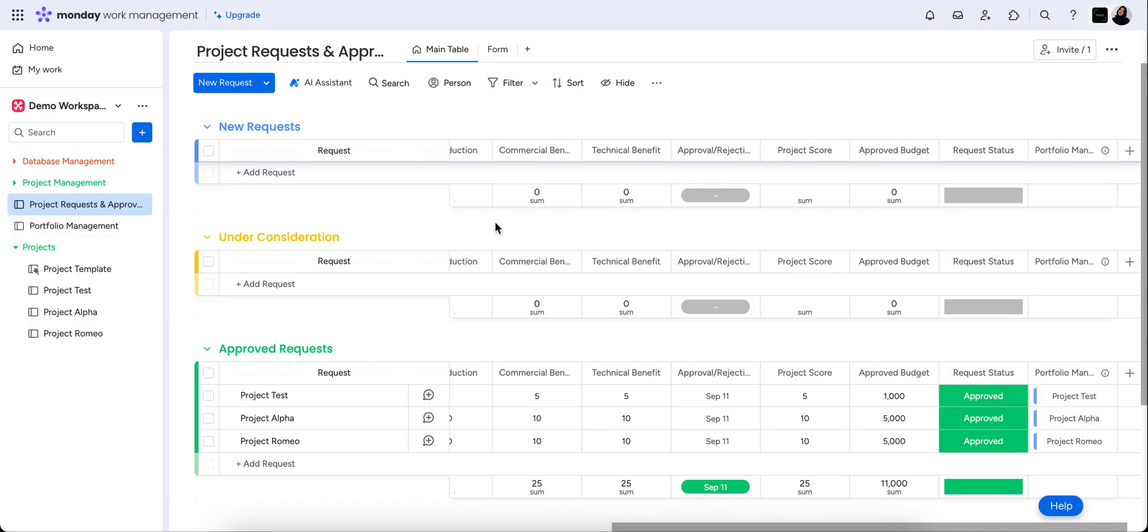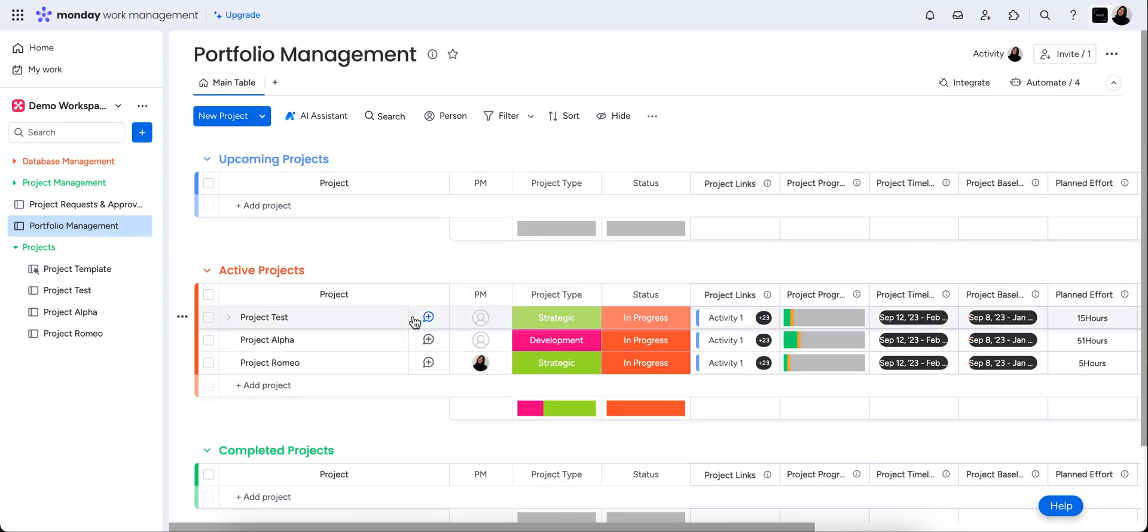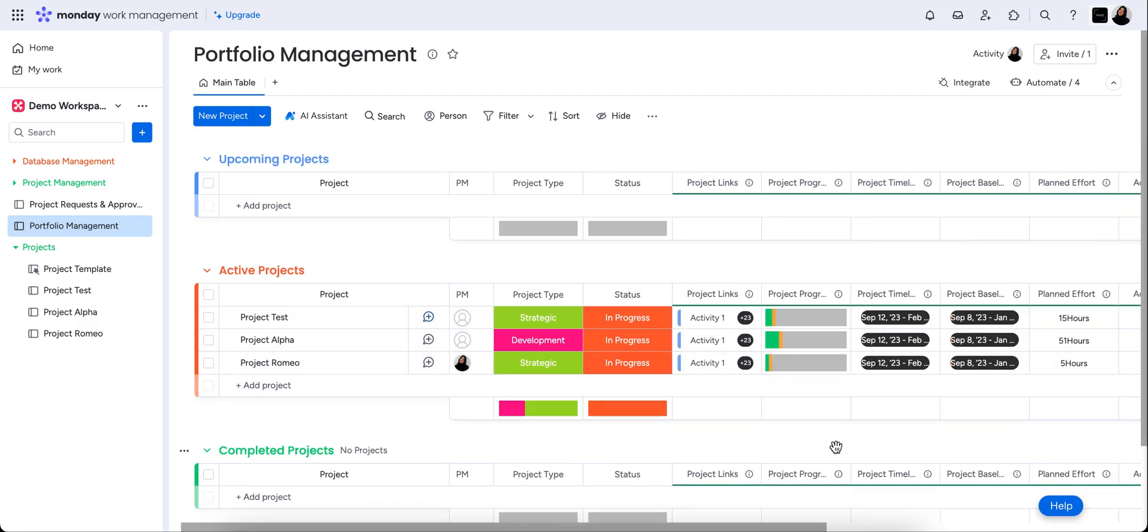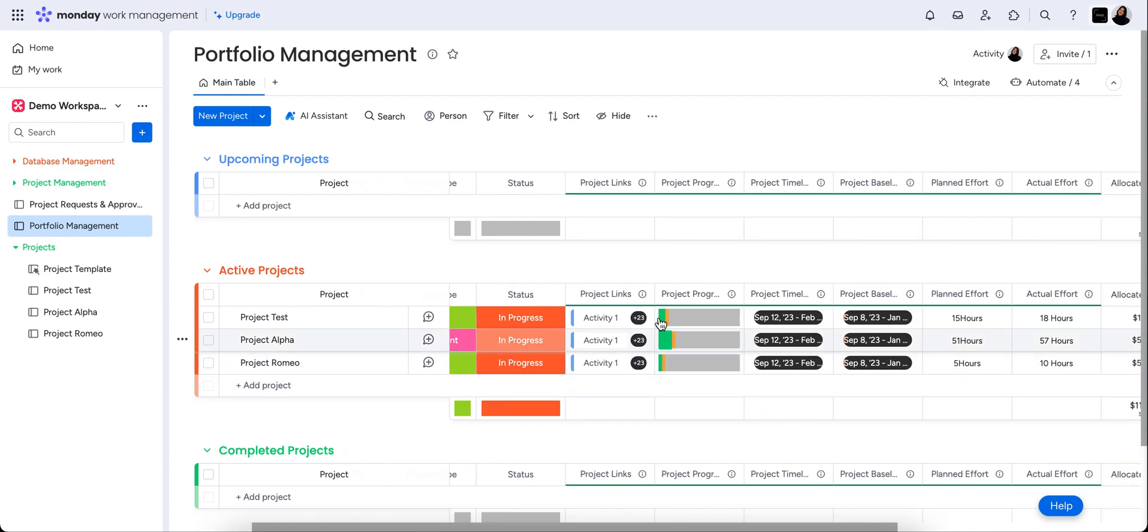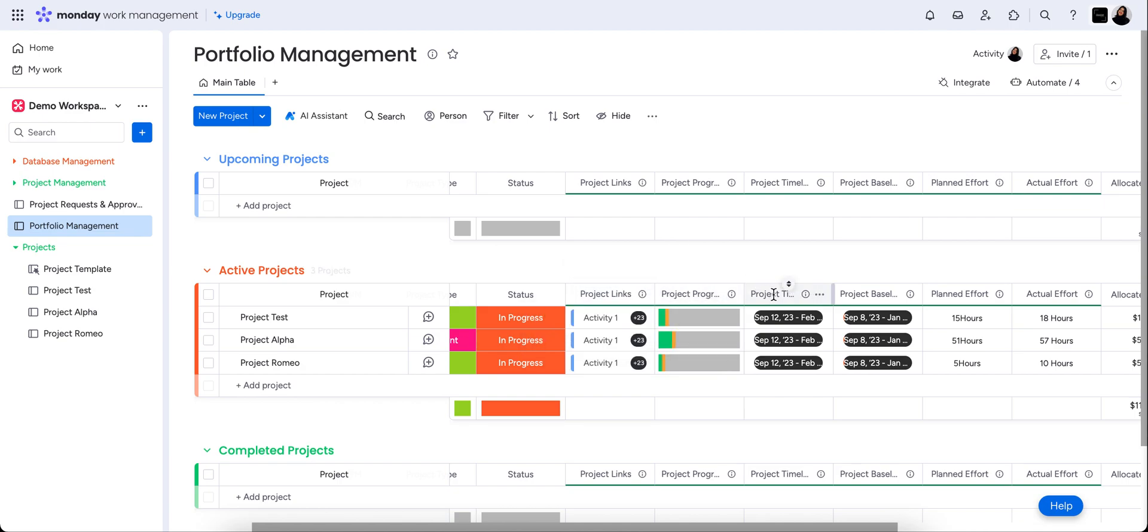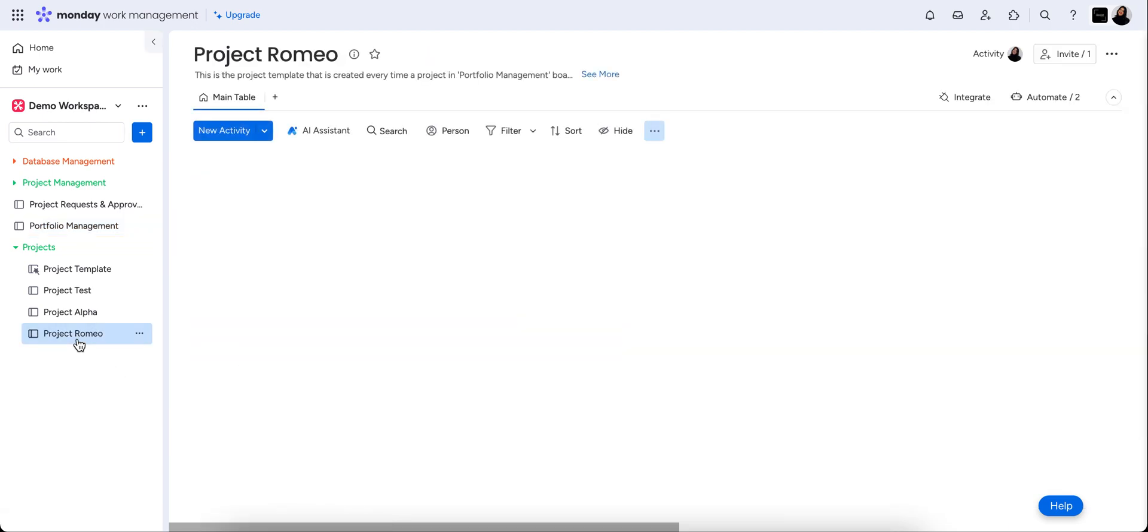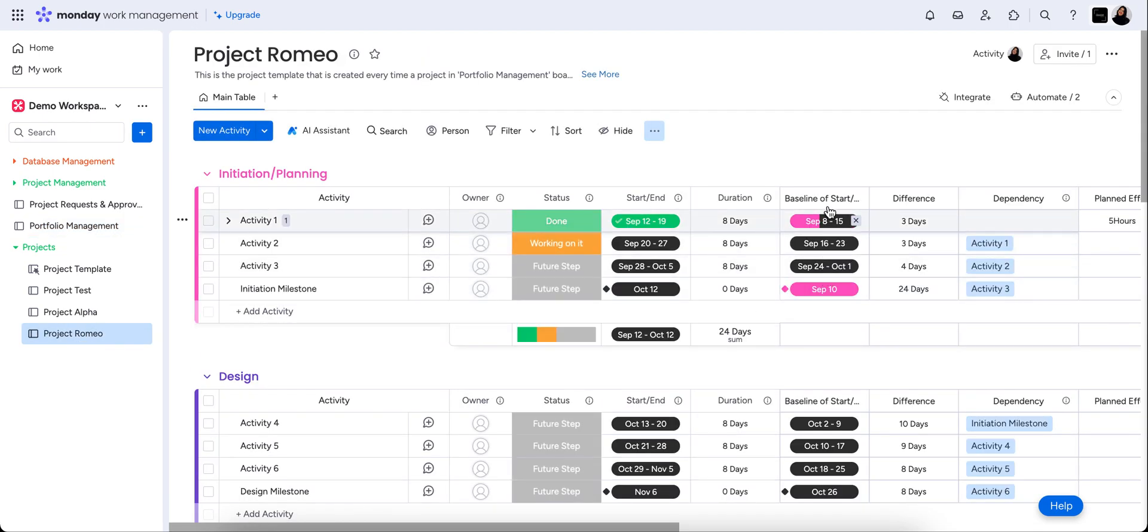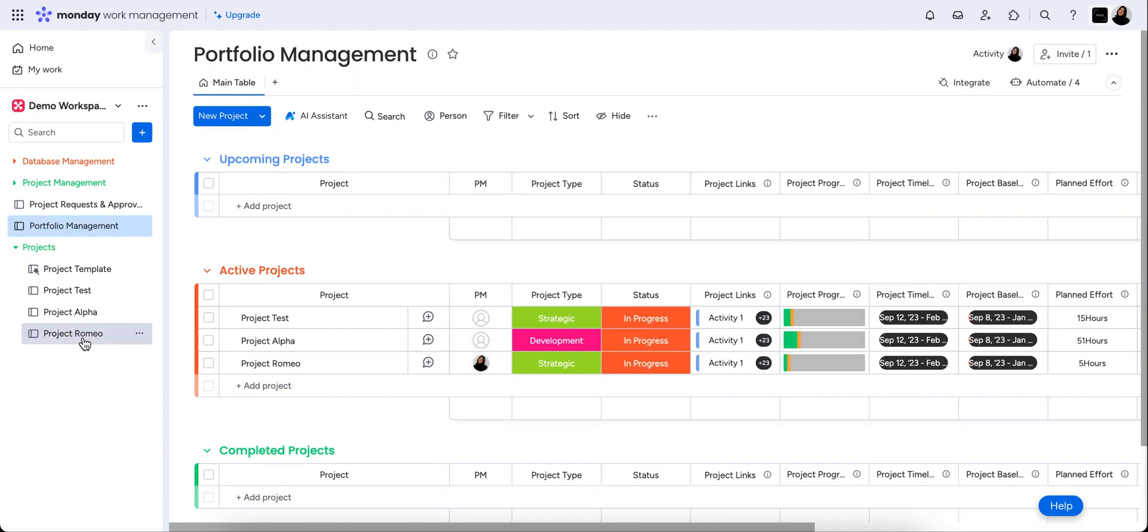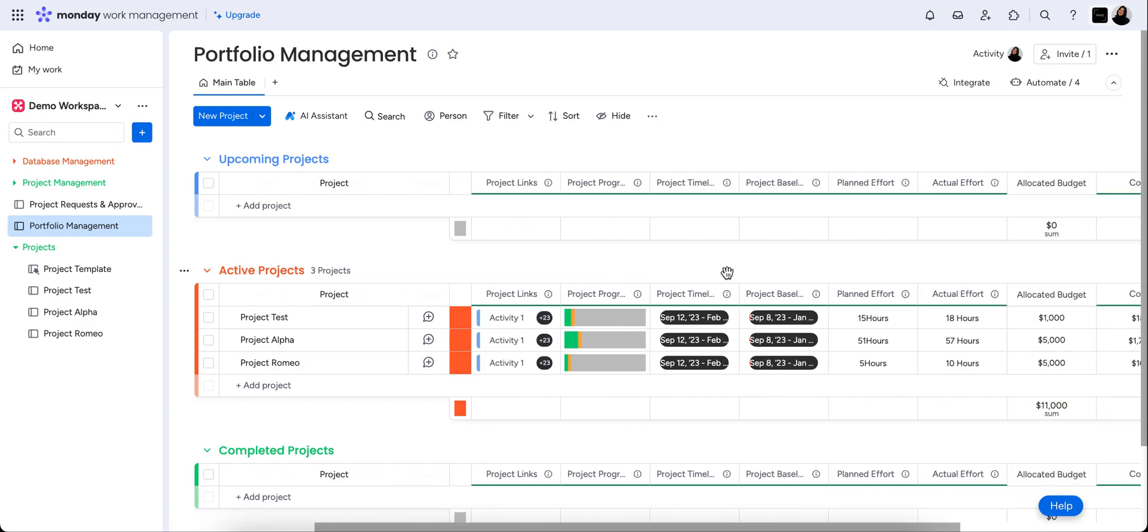Now, the way that these high-level, low-level boards work is that they're actually just mirroring information from one to the other. So as I said in the previous video, anything with an eye on here is generally showing that you're linking items from other boards. So the project timeline, the baseline timeline, the planned effort and actual effort, these columns are mirrored from the actual project board, which are these ones here. So we're just mirroring the information on this board to the main board, which means that any changes that are made in these projects are all going to reflect here, which means that high-level or macro view of the project can be seen in one spot and it's continuously updated.